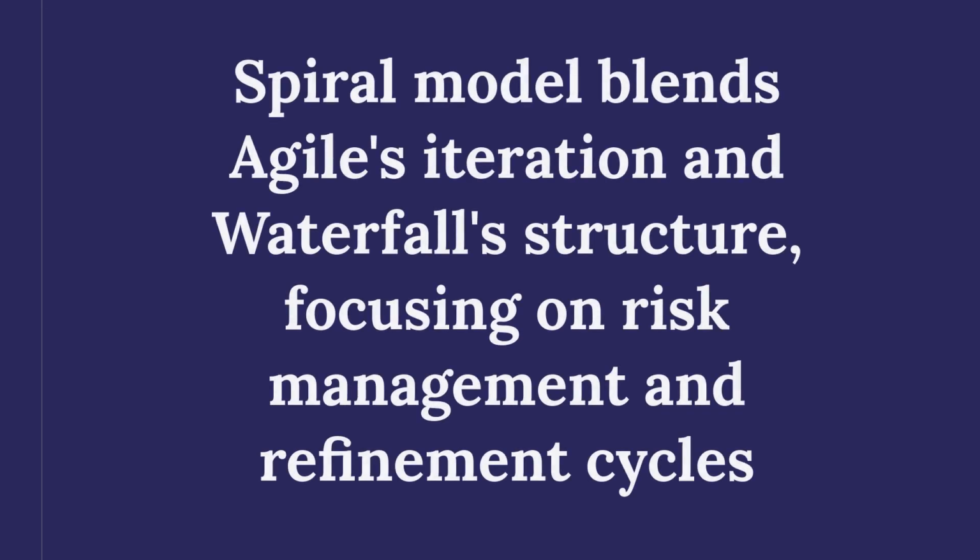The spiral model combines Agile's iterative nature with waterfall's structured phases. It emphasizes risk management and repeated refinement. Each cycle includes planning, risk analysis, development, and testing. Suitable for large, high-risk projects, it allows gradual improvement. Expert management is required.